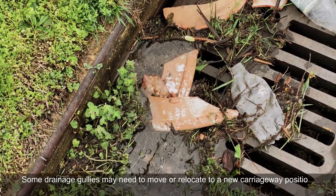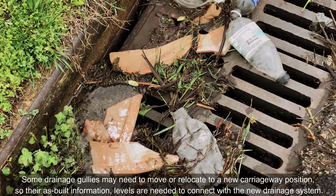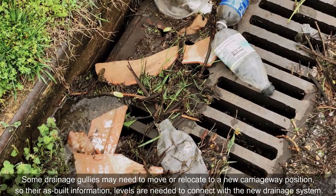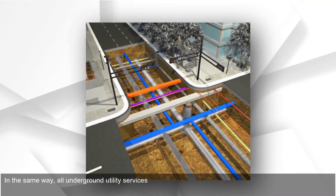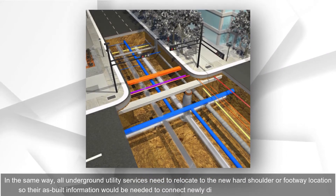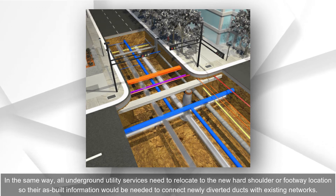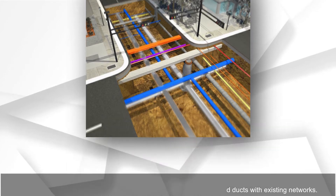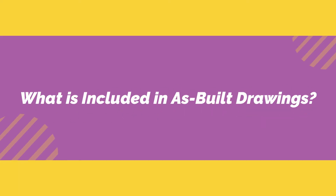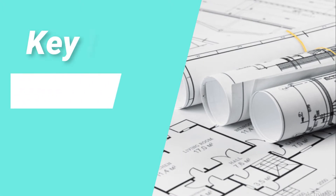Some drainage gullies may need to move or relocate to a new carriageway position, so their as-built information and levels are needed to connect with the new drainage system. In the same way, all underground utility services need to relocate to the new hard shoulder or footway location, so their as-built information would be needed to connect newly diverted ducts with existing networks.